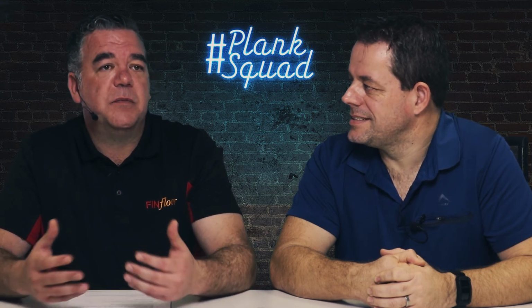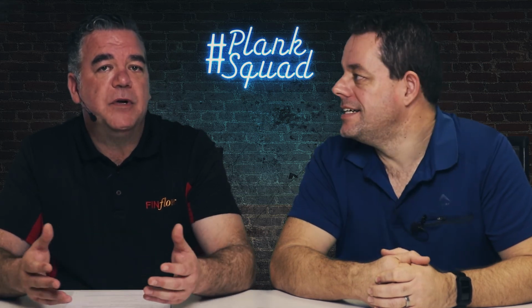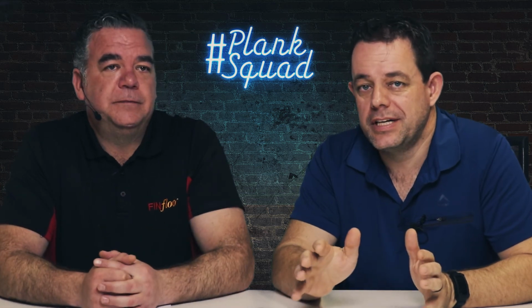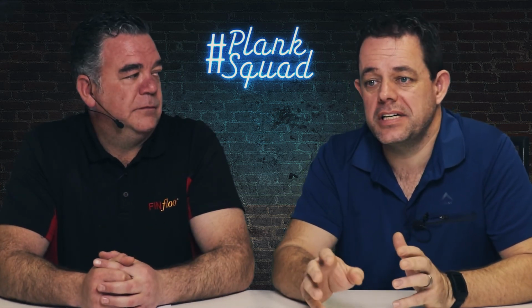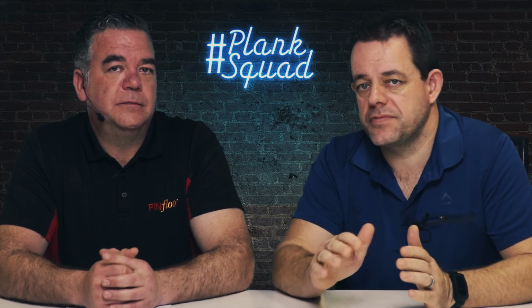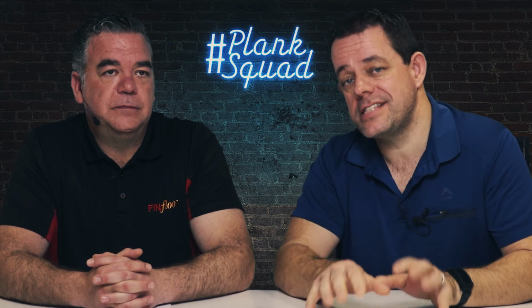Because there's certain products you definitely don't put down, like plastic. It will sweat, it will damage your floor. So there are some good products in the marketplace that we should invest in and actually build into the cost when we're quoting the clients. Absolutely. So this is a massive thing. You can't use packaging cardboard. Packaging cardboard does not work. It's too soft. It just sucks in the moisture and it permeates all the way through. There are protective products out there that are designed specifically for this situation.